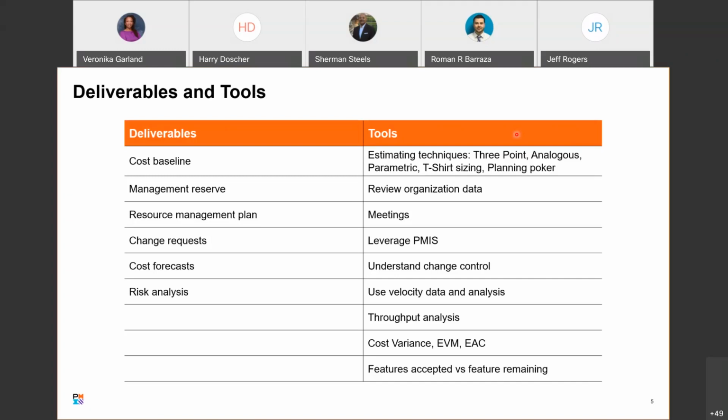So you need to know about those terms too, product owner, backlog, and how you would change things. So that under an agile project, the product owner has a lot more authority and ability to change things than in a classic project.